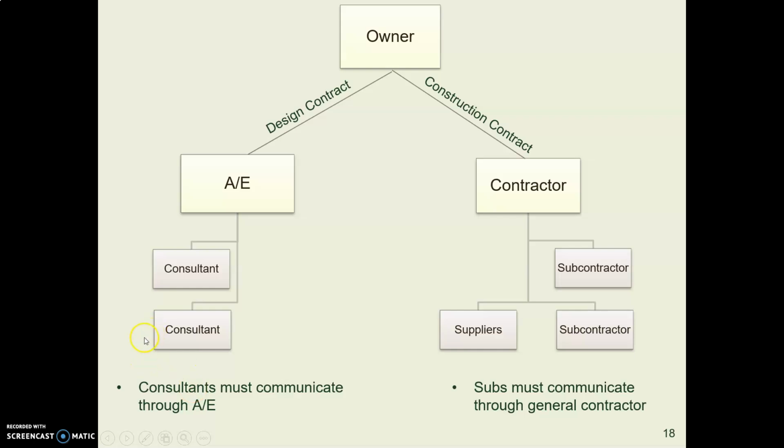You, in your company, are not allowed to go over to the job site and talk to that fabrication sub and suggest what you would like them to do. That is strictly not allowed through these contracts. So you have to go through your chain of command, they have to go through their chain of command. And that keeps everything adhering to what the contract says.